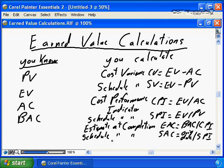And then finally, the schedule at completion is the SAC, and I've added a new term in here, which I'm calling the original date. There does not seem to be an acronym that I can find in the EV literature for this. It's the original targeted project end date, and it's not going to be in terms of a calendar day, but in terms of the elapsed time for the project, over your SPI. So again, yes, 6 formulas that you have to memorize, but it's not that bad.